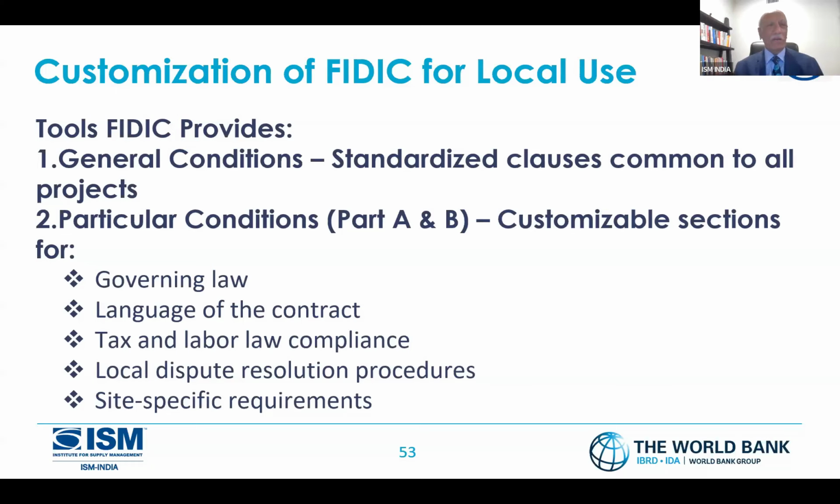You may like to have Spanish. You may like to have French. You may like to have English, or Arabic or some other language. You can have it. Tax and labor law compliance, local dispute resolution procedures, site-specific requirements. So those things can be added into the particular conditions. And in case you're feeling that currency fluctuations could happen, then that also could be hedged into this.